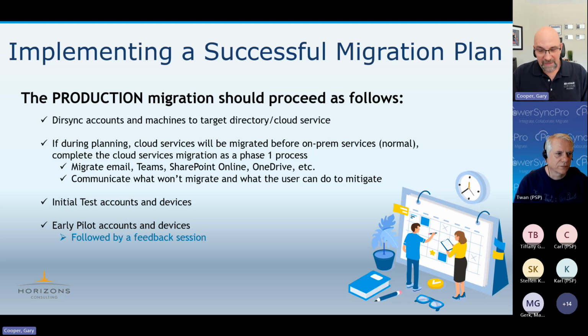If you're planning on doing cloud services as part of your migration, this is not the direct focus of this conversation, but it's involved. Are you going to do that at the same time as you migrate users and workstations on-prem? Are you going to do it first? We find that most organizations want email to go first. That's how they want to communicate with other people. I think Teams now is a close second before the workstation migrations. In doing so, you need to help executives understand that when their email changes, it doesn't mean the migration's over, because we see that frequently as well.